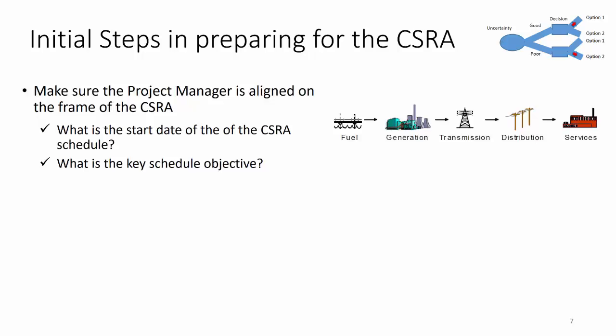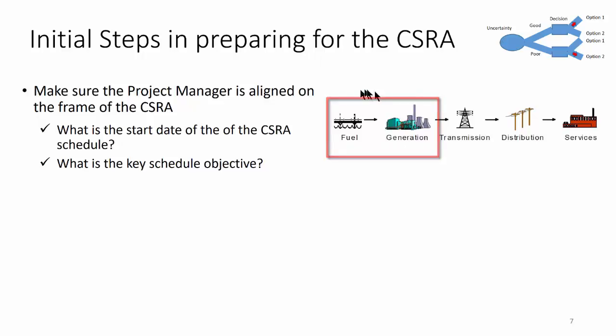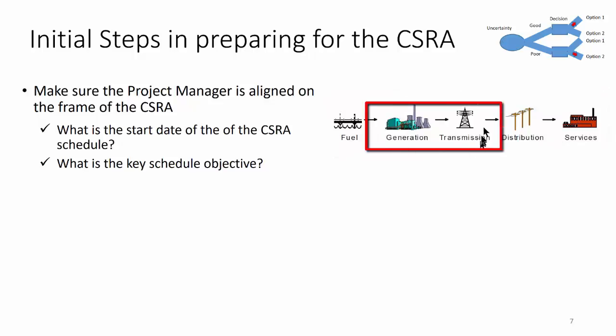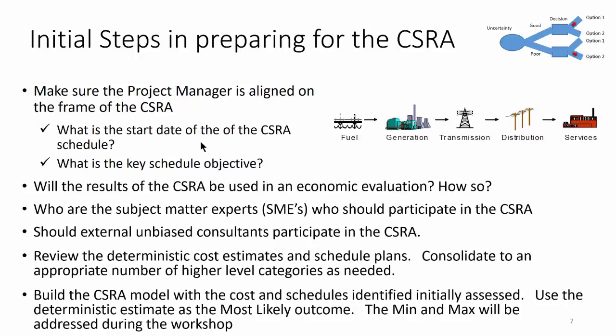The initial steps in preparing for the CSRA is we need to make sure that we have the right frame. Is the project we're trying to assess simply the fuel and generation, or is it the whole value chain, or just the generation and transmission? We need to understand the scope of what we're trying to assess and build. We need to get very specific on what is the start date of the CSRA schedule — I may be in front-end engineering and really want to do the CSRA from FID. And then what is the schedule objective — is that when I'm ready for startup, or the first loading of a ship, or the first transmission? We also need to ask whether the results of the CSRA will be used in an economic evaluation, and if so, how.